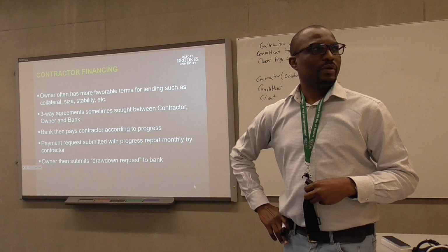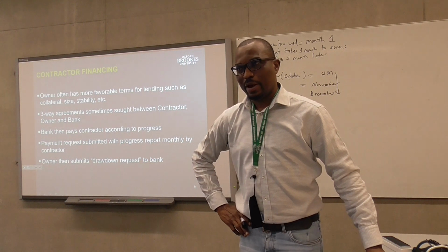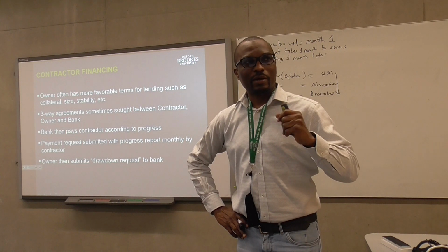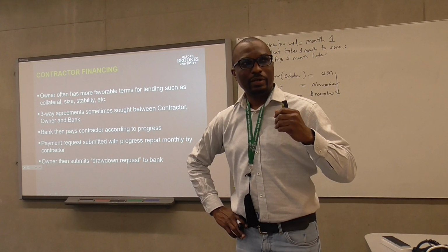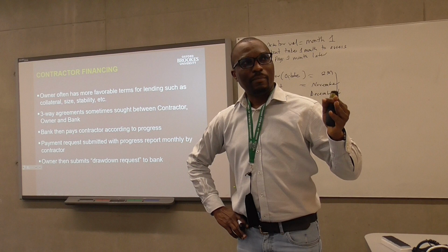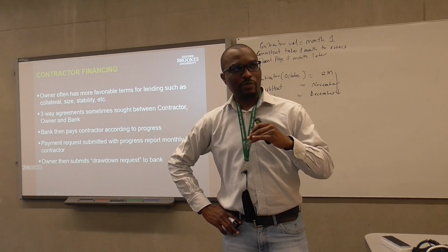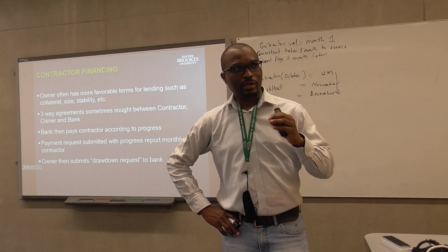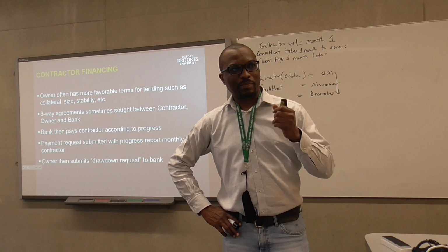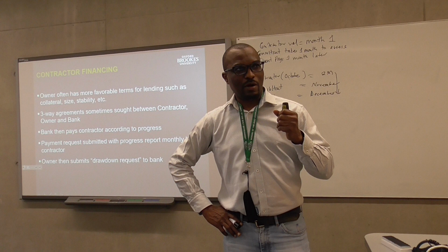Okay, so normally what they're trying to do now is to have what's called a project bank account, right? The escrow accounts you're talking about then? Kind of the project bank account, where at the very early beginning, the client needs to show that the client has adequate money for this project from the project bank account perspective. But then, usually, insurance for large scale project, one, the contract normally has clauses or specification in terms of when contractors have to pay, if there are delays, the sort of interest clauses that apply. And then obviously, for very large scale projects, insurances are also taken.